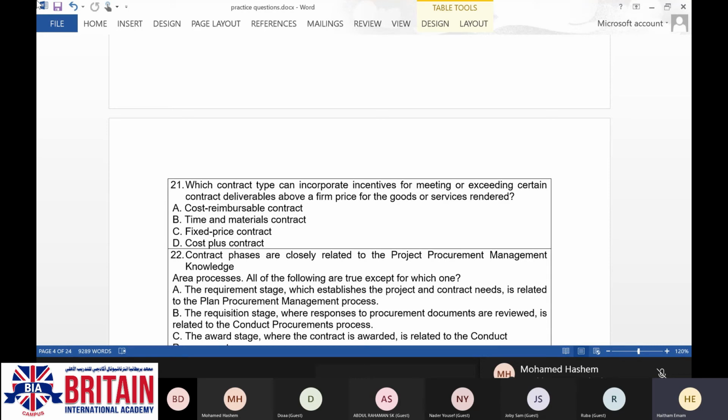Which means if you have agreed with him to finish this project within 6 months, that is a standard time. But also, you tell him that if you finish this project within 4 months, or 4 and a half, or 5 months, you will be eligible to take this amount of money. Otherwise, you will take only the main amount. Is it clear till now?